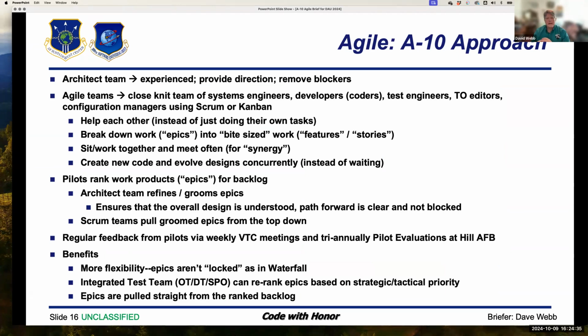We also reviewed each of these epics, as engineers, and looked at any type of blockage conditions. For example, hey, this product would be great to integrate. The problem is it doesn't exist yet. Or we don't have the ability to test for it. There's no test stand for it, or something like that. So we would go through the whole backlog. There are somewhere around 700 epics in the backlog right now. We typically only deal with the first 100 or so in any one update.